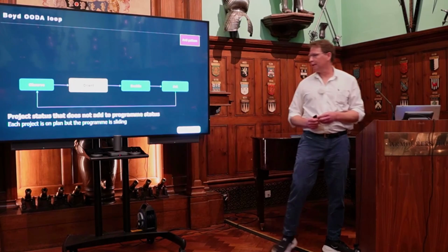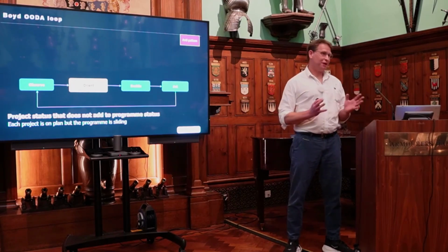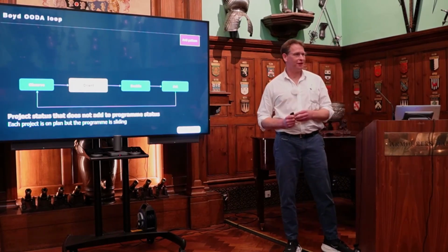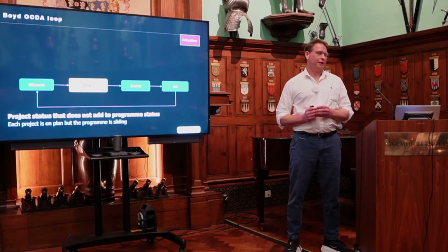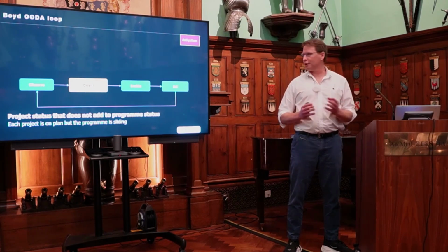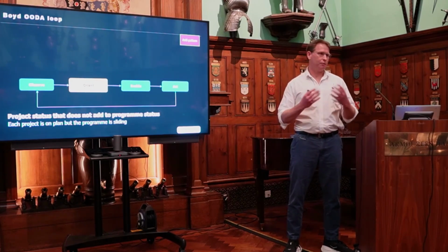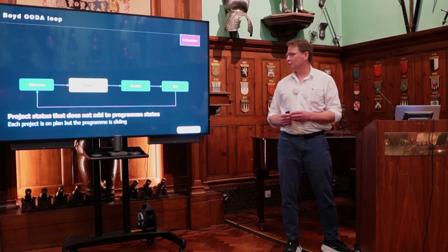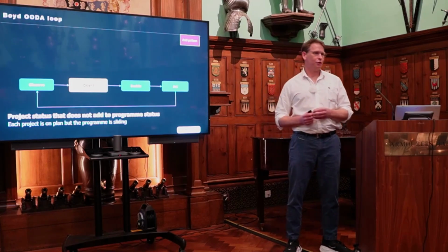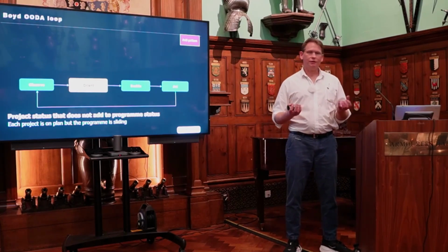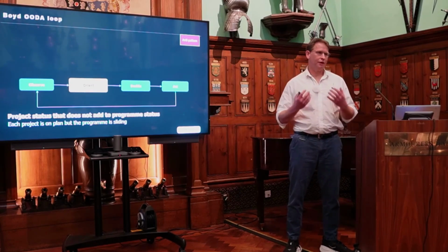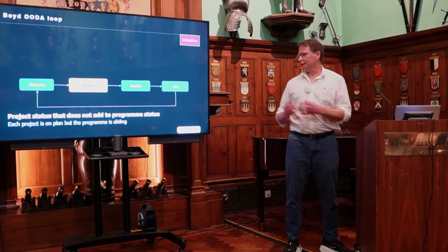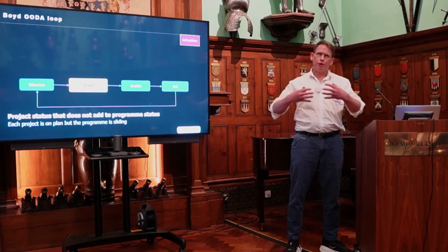Metro example. Strangely enough, we had very good project status, but a lot of the cross-cutting things that a project would rely on in terms of programs weren't being noticed or recorded. There were lots of dependencies and common resources across the projects, meaning they were programs supporting program outcomes.